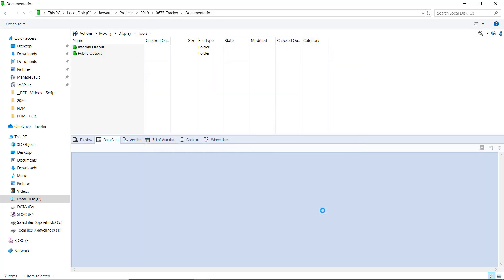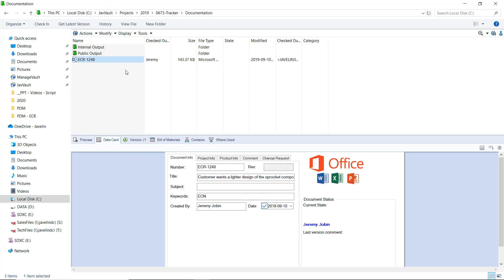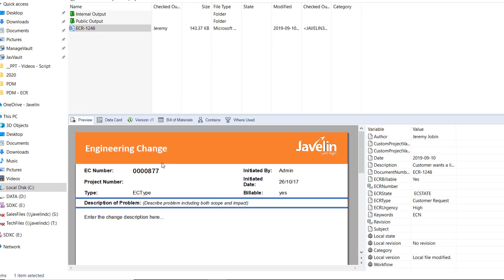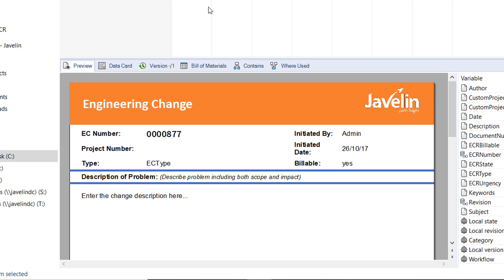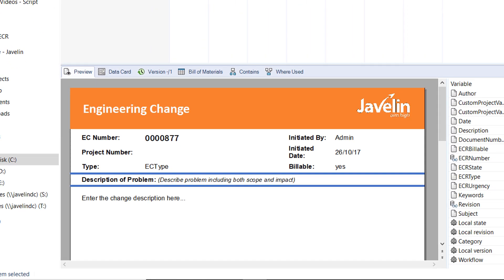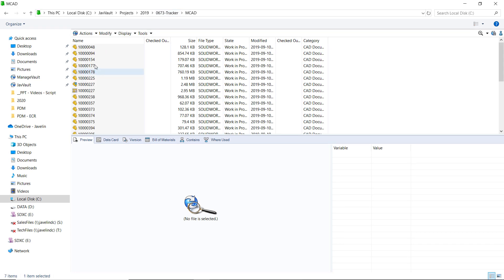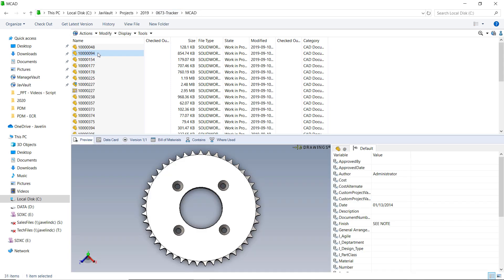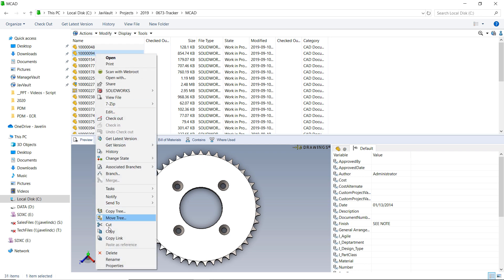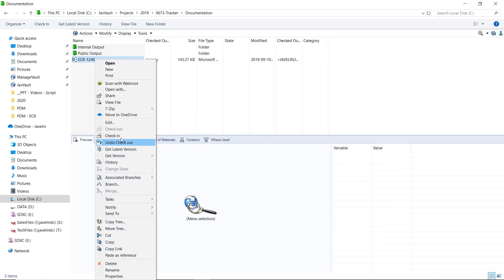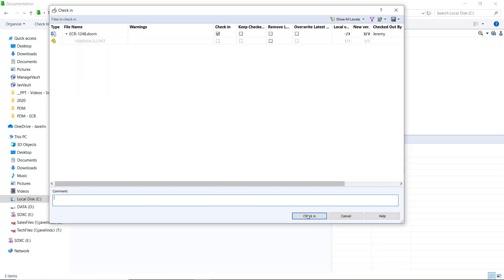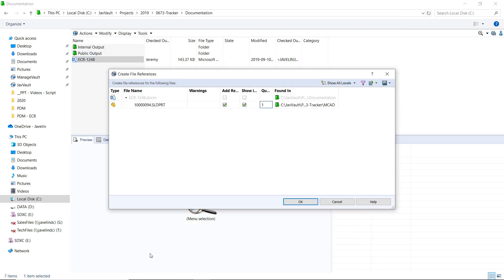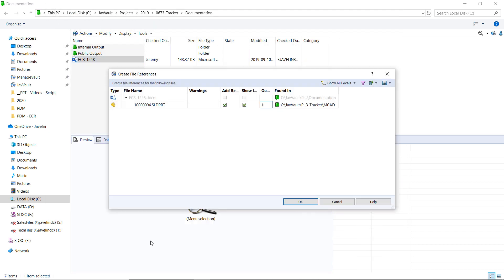Once the required fields are all filled, we can accept this and our document is created, ready to be shared. We will then attach the necessary files that are affected by this change. And you will notice that here, we do not attach but paste as reference. This eliminates the risk of duplicated files and maintains a direct link between the affected documents.